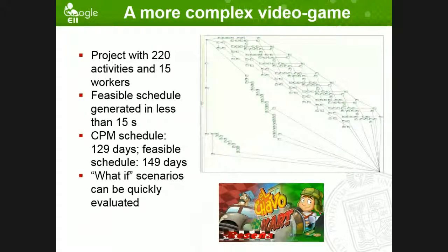Another thing is the algorithm works very, very well. But for the project manager, optimality is a concept that doesn't exist. For them, one thing that is very important is to have a feasible schedule in terms of resource assignment. In Microsoft Project, you can over-assign a resource. And so basically you say, this is the schedule, but this is not a feasible schedule. And for them, the quality of the schedule is measured on how much over-assignment there is.